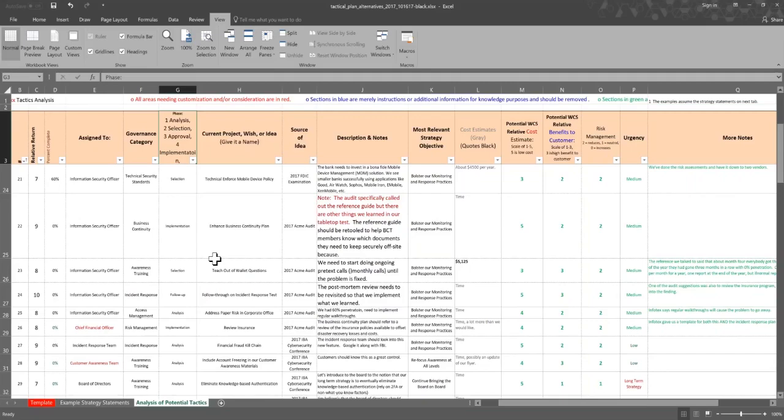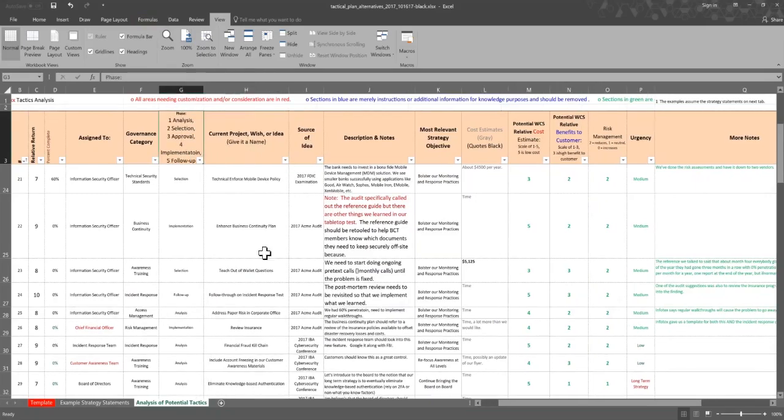The selection process, in my opinion, is where you should do your vendor due diligence, your risk assessing, that sort of thing. You shouldn't waste time doing that during the analysis process, other than maybe trying to understand what the inherent risk is. But anyway, most of the smaller community organizations, I can see, are maybe going to eliminate that. Although the client that I was talking about that sent the example, I think they are keeping track of what phase they're in.